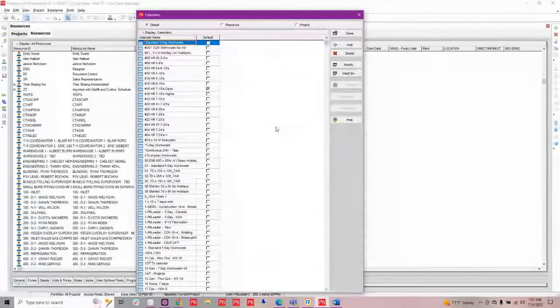And the problem with that is that the definition of that XER calendar will overwrite a calendar of the same name in your database. So it becomes an issue as to, okay, which calendar am I actually using? Is this the one I'm expecting that has been ours all along, or did it get overwritten and now it's messed up all of my schedules where I have that applied?